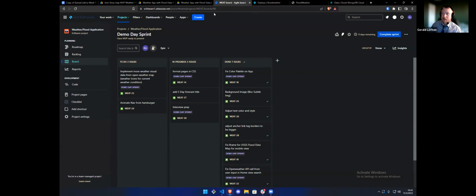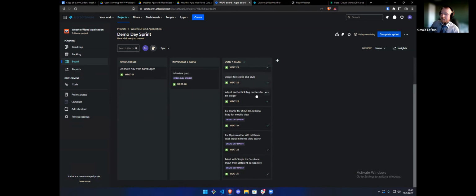Then, like I said, learning agile methodologies. One of the things that we utilized was backlog items for sprint planning and a roadmap. Even then, I still add on to the to-do list on here of stuff that I want to use, even though the sprint's done. It gives me a good idea of what I still want to implement and what I have done so far and all the done stuff.